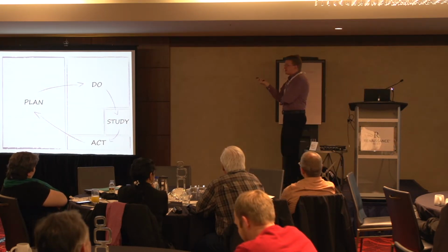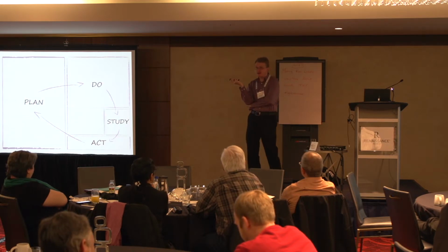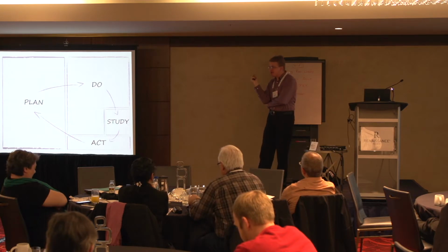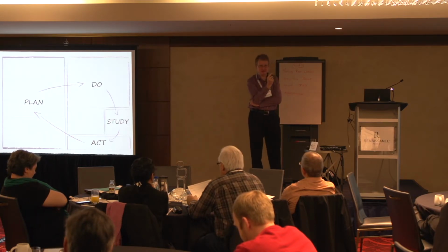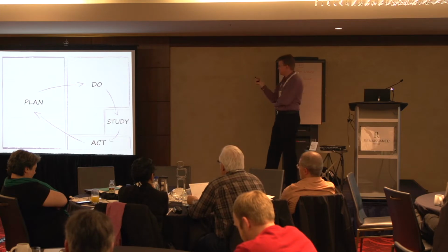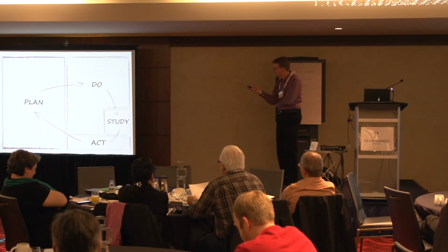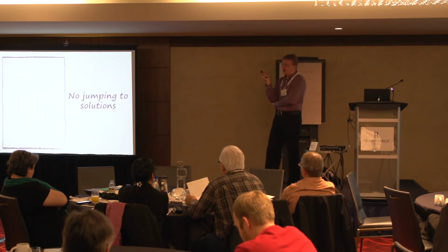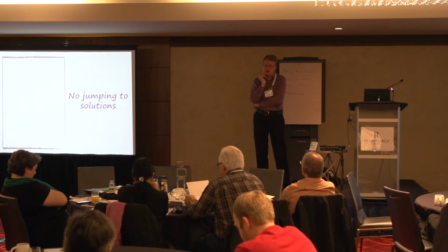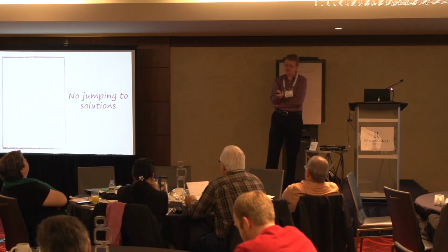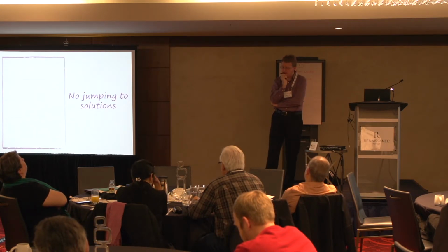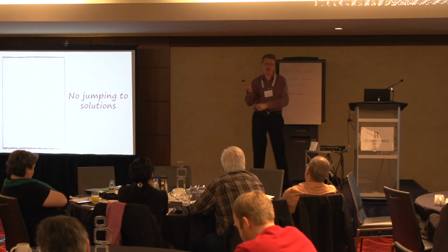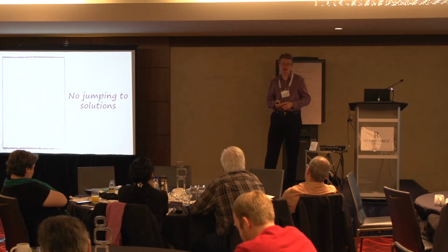And so with that, the left side of A3 came together, and that's a lot of work. And that is just the P part of the PDCA cycle. Plan, do, study, or sometimes it's called check. It's PDCA. And the way A3 evolved in Toyota was deliberate. So people counter their natural tendency to jump to solutions.